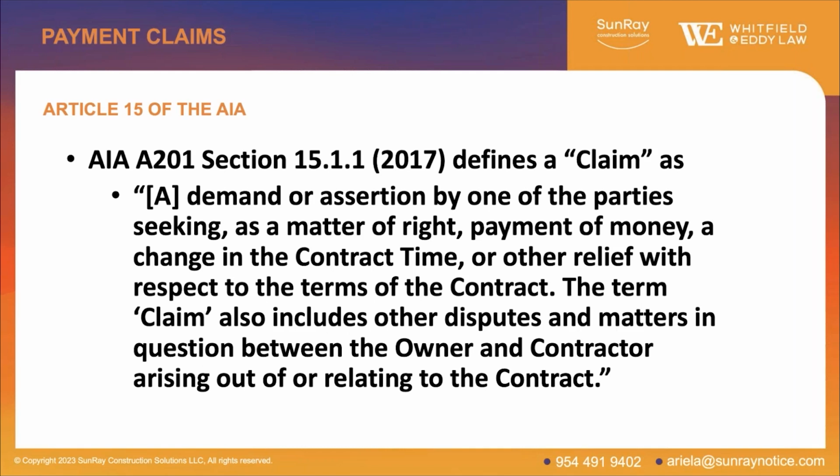I've found that a lot of contractors don't realize that time claims are subject to this. And that can be important if you're dealing with liquidated damages or delay damages by an owner, and you think you're entitled to extra time, you need to make a claim for that. So keep that in mind. We go to the next slide.